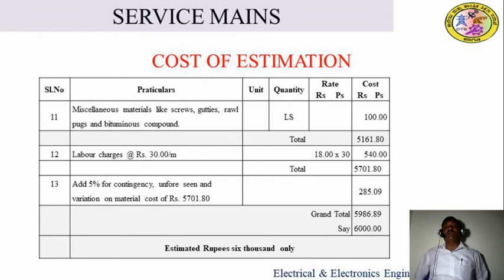All these materials you have to calculate one by one, and put them in a schedule of material column, that is a particular column, and a quantity column, how much quantity is required. What we use is a schedule of material, or simply called a bill of material, the material required for providing a 3-phase underground service to the customer. This material list we have to submit to the shop owner. As per the given specification, without confusion, directly you have to provide all the material.